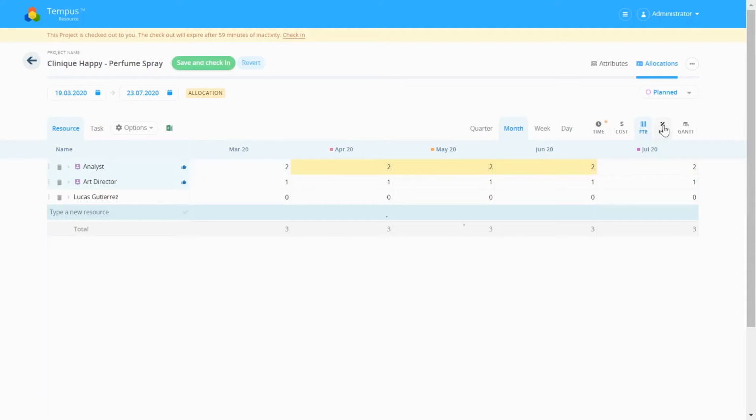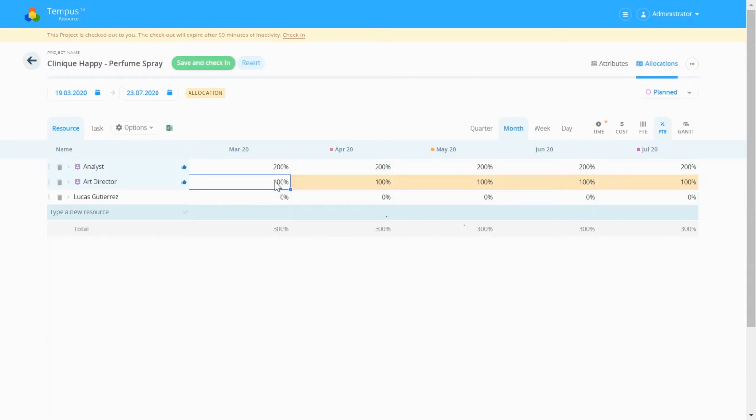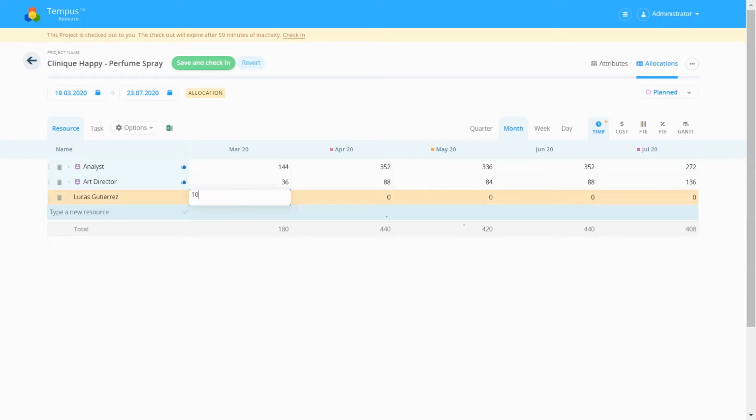Or some people do it by percentage of time. I need 50% of this generic resource's time. Or some of you do it by hours. You specifically say, you know what? I need 100 hours of Lisa's time. So by entering your request, you're basically saying, on this project, I need these generic resources or this named person. Very simple. It's just like Excel. There's a lot of other ways that we can enter this request, but I'm just giving you a general feel right now. This is how you just put the initial requests in, okay?